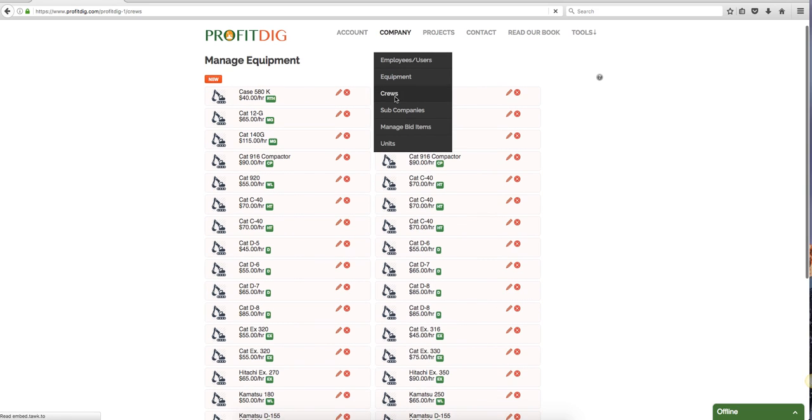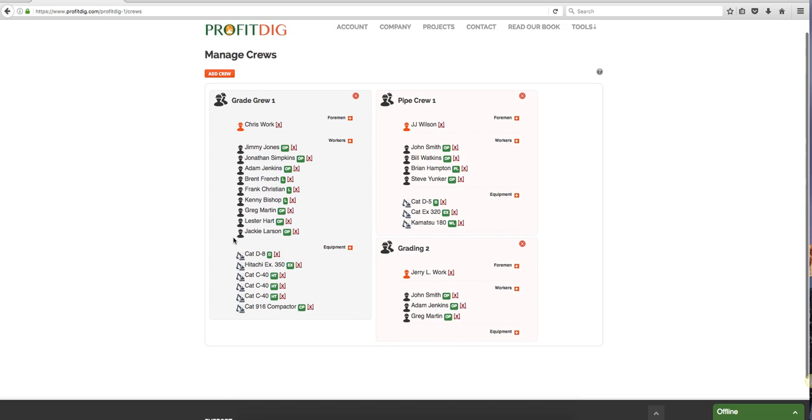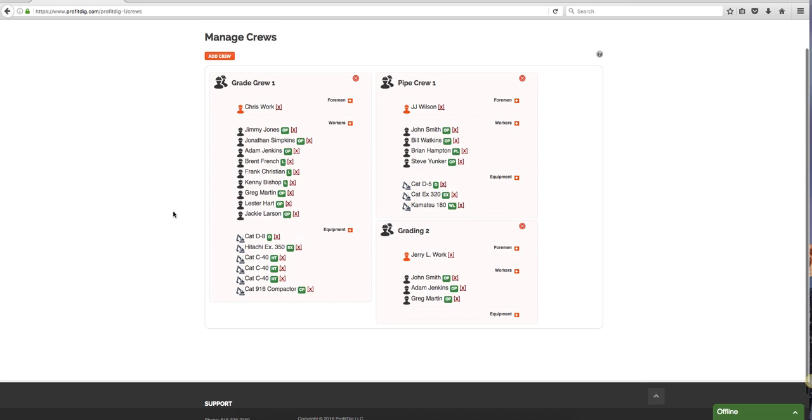Once I go to my crews, this is where I can piece all of this together. The reason it's important to have a crew is because, for example, my grade crew one - I can see I have a foreman, I have all of these people here, and I have all this equipment. Now granted this is demonstration purposes, I probably don't need three C40s here, but the idea is that I can build this out. If I need to use grade crew one on a job, then I can build that grade crew, then I can assign that grade crew to bid items on my bid proposal, and the bid proposal will account for all of this expense that's gonna fall on me during the job.